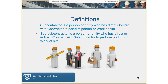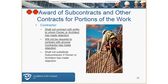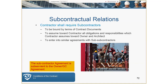Subcontractors are working for the contractor, contracting directly with the contractor to perform portions of the work at the site — sometimes referred to as trade contractors. The architect or owner can object to a subcontractor; however, if this adds cost to the project, the owner may be on the hook for the difference. The subcontractor agreement is subservient to the owner–general contractor agreement, and if you use AIA forms, that subcontract will incorporate the prime contract.